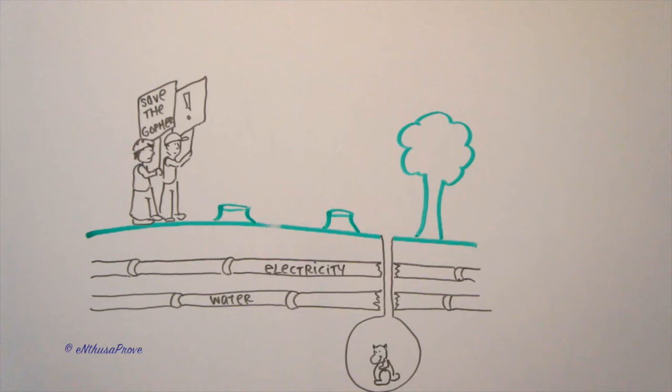But how much do you allocate? Consider the familiarity you have with the job. Have you done it before, or is it a first of a kind? You would likely allocate more contingency for a first of a kind job and less for a job that's been performed many times. Contingency decisions also include consideration of the contract structure and the awards, if any, for early completion or finishing under budget.